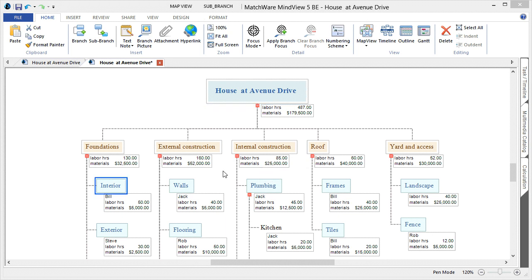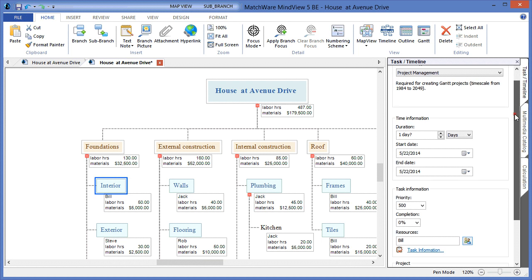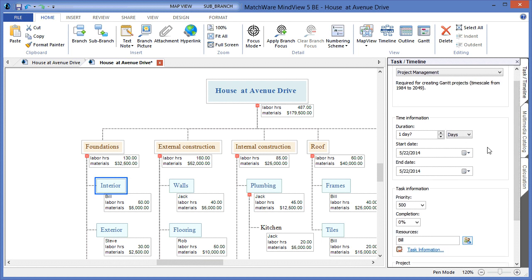The next step would be to go through each individual item on the work breakdown structure and start assigning due dates, durations, and start times on the specific task items. To do so, I would simply choose the item from the individual work breakdown structure list. I would choose the task timeline panel on the right side of my screen, and I would then associate a start date for that particular task.